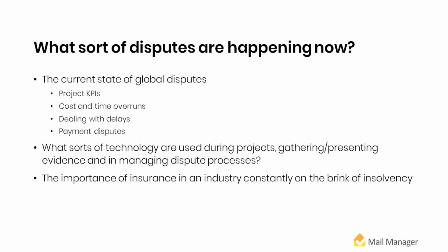You can see this backlog of problems on projects that's going to work its way through, where projects have shut down, as Graham was saying, in Canada, or where claims have been made but are yet to be resolved. Now, whether you formally call those disputes or not is questionable. But if you put those in a slightly different category and then look at the potential for a second spike in COVID-19 force majeure issues, new projects that are coming online will have a different reaction to COVID-19. Now, we've got legislation in place that talks about how you work in a lockdown environment. Actually, force majeure won't apply in the same way in those cases anymore.